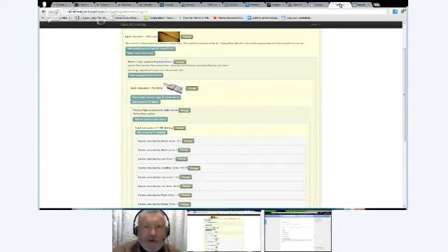And so all of those then go up on the schedule. The schedule will be presented on the timeline, and would also be presented on a Gantt chart. And so you will see all these things. We need somebody to do this particular type of work to make mirrors for these joint transducers. And the joint type transducers are due next Thursday, and the mirrors have to be done by Monday. At that point, a bunch of different things can happen, and you have to decide at some point what you want to have happen in what level of detail.